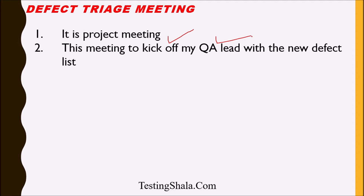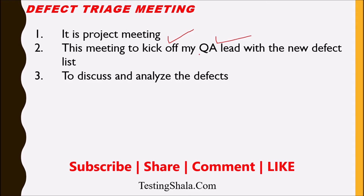The main purpose of this defect triage meeting is to discuss all the new defects logged in the system, as well as analyzing each defect for its severity, priority, and impact on the business.